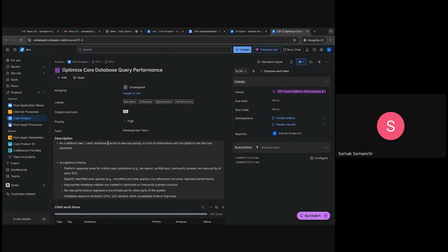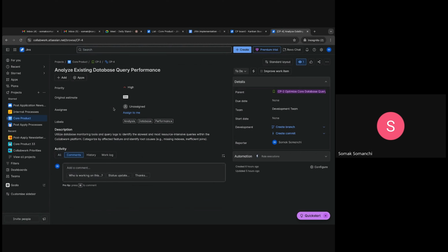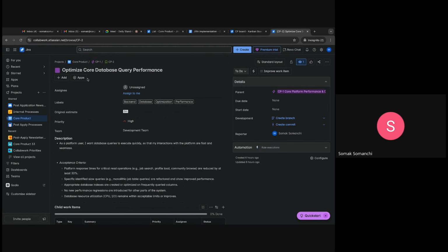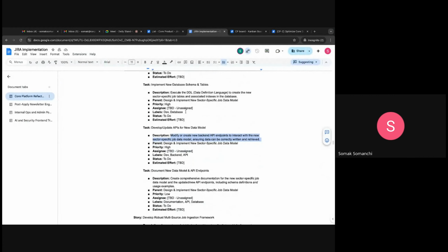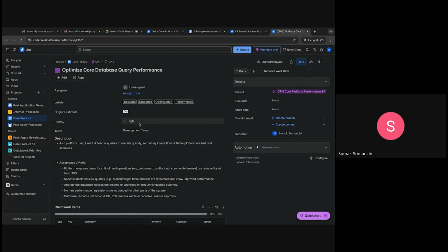Now one thing I'll just remind us is task type is a separate entity in Jira, and story is another entity. They both can host child entities, which is subtask, but not each other. So if we go here, we cannot add task, but we have added subtasks. Similarly, all the fields as we have in the Jira implementation board, we have written there, and these 2 epics are almost done. I was in this portion of it, and yeah, developing the rest of them.